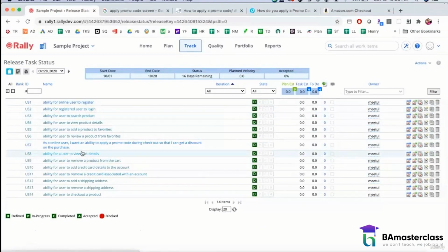Now, on day one of the sprint, the first thing you have to do is conduct a sprint planning meeting. So, who all are present in the planning meeting? You have the entire development team. Now, in Agile, the development team refers to everyone. So you have the developers, the testers, the DBA, everyone is referred to as the development team.